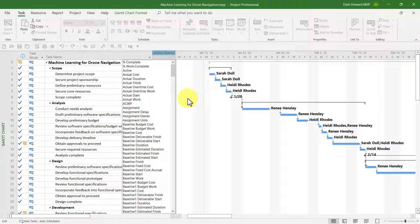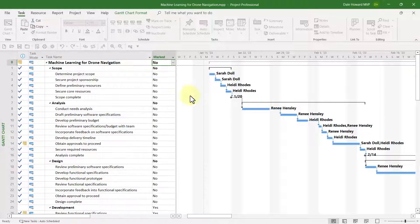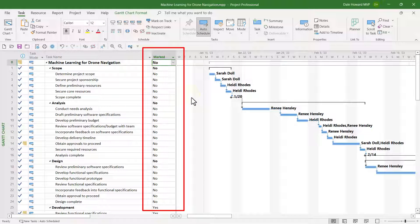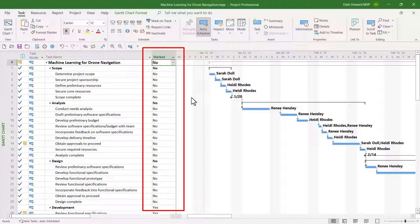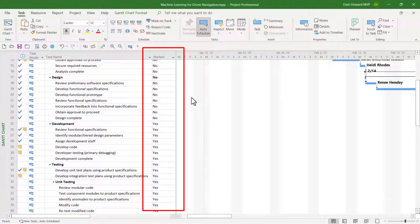In the list of available task fields, select the field called Marked. The Marked field is a flag field in which the initial value is set to No for every task in your project.